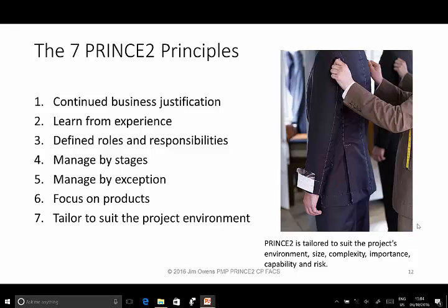The reasons for tailoring are to ensure that the project properly matches its environment and that the controls are appropriate to the size and complexity of the project. Tailoring can be up or down. This means you can add more detail or remove detail depending on the project. The project manager and the project board should agree on the tailoring, and the details of the final tailoring should be recorded in the project initiation document. It is highly recommended that before tailoring a project, you examine lessons learned from at least one other similar project to see what was decided and what worked well and what did not.